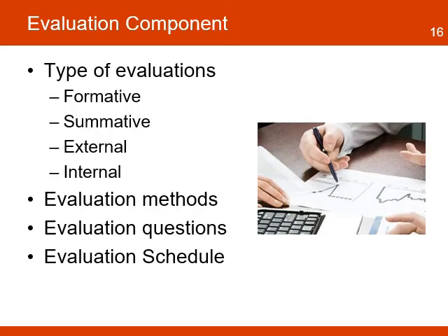The evaluation component of the M&E plan includes the following elements. Type of evaluations. They can be formative, summative, internal by a unit in the organization, or external by a consultant. The evaluation methods, such as structured interviews or surveys. The evaluation questions that seek to answer key concerns about the project. The evaluation schedule, which should include the timing for the midterm and final evaluations.